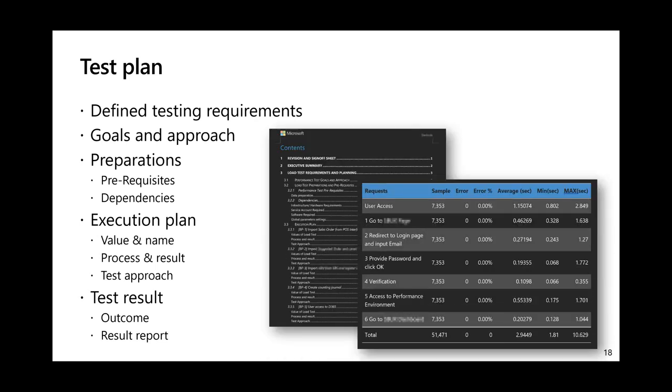And then it's very important to let the team know what the execution plan is. I have tested each scenario in the UAT environment, firstly to understand how the application operates with the scenario. For example, I have one scenario, the sales operation. So what is the exact flow in the sales operation, and what are the detailed steps I need to simulate? I tested them in the UAT and captured the flows, required field names and values, and also the step-by-step screenshots. Finally, I have provided the testing approach.